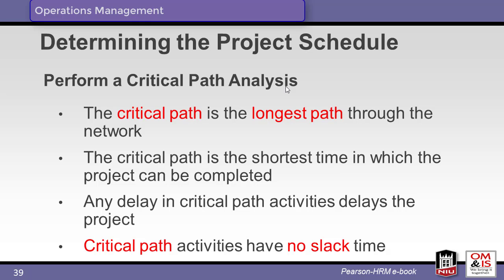Once the chart structure has been defined, we add the time duration for each activity. Note that the actual project length will not be 25 weeks, since some activities will occur in parallel. In the next discussion, we will build upon this structure to take advantage of these tools. This is the end of Part 1.